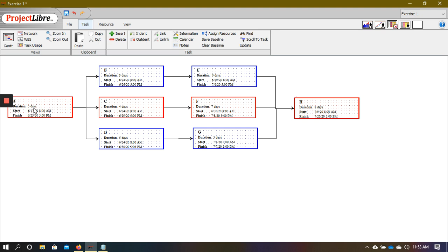Then we have the second path, which is the one through the middle, and that is path A, C, F, H. And if you add across this, we get to 24 days. So that's the longest path.